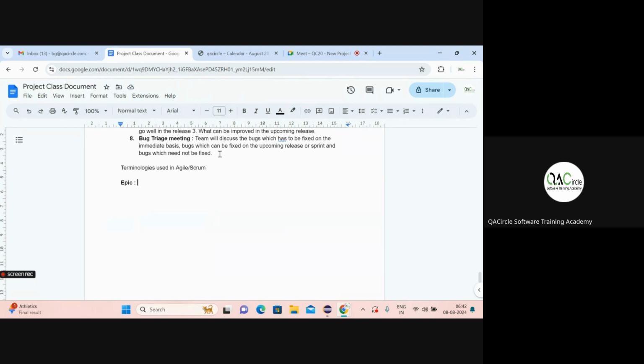And once the user signs up and does any transaction, then the user who referred that new user should be getting some rewards. This would be my fifth user story. I'm telling it on a briefer note, but it might have more stories. Why? Because they'll have to create a database table for it separately. For that, there might be a backend user story.